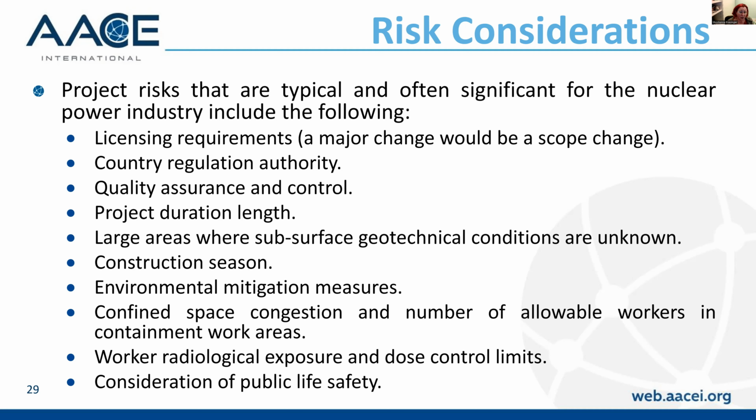Here's where we need to really think, because the fact is, research has indicated that for weak project systems or complex or otherwise risky projects, the higher ranges may actually be 2 or 3 times higher than the high range indicated on the table. In fact, one study of nuclear project cost growth and schedule slippage indicated that the need for contingency, set at P50 and including all our risks, was approximately 70%.